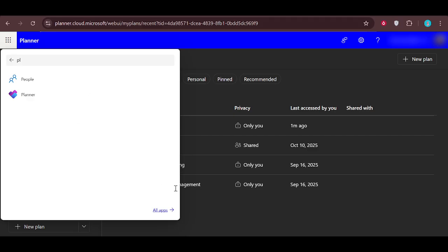After the import is complete, the key benefit is that this project can then surface in Planner as what's often called a premium plan. From the user's perspective, it shows up inside the standard Planner interface, much like other plans you might already be using, but with richer capabilities behind the scenes. In other words, you opened your MS Project XML file by importing it through the Power App, then viewing and managing it in Planner as a premium plan.